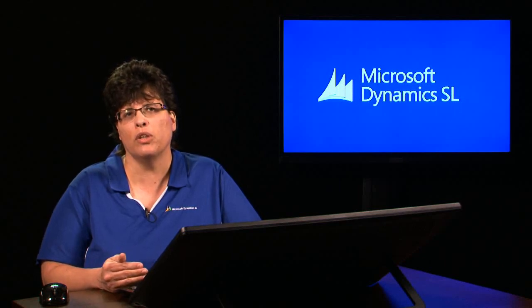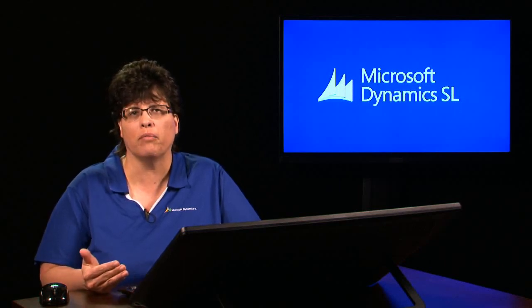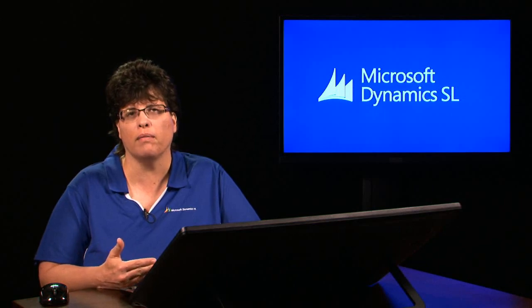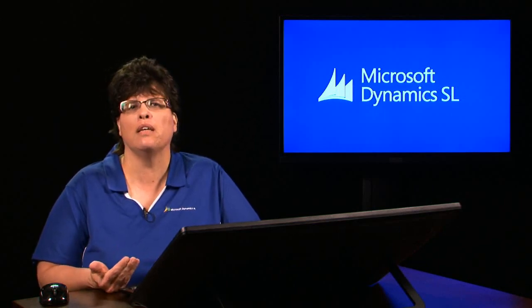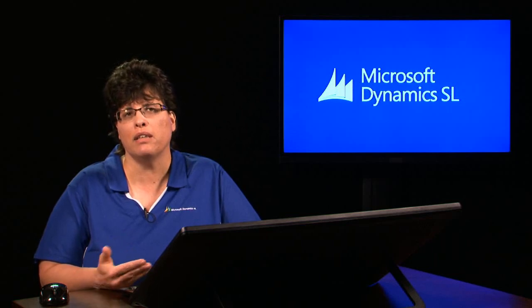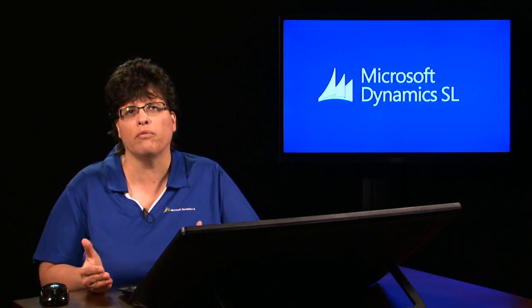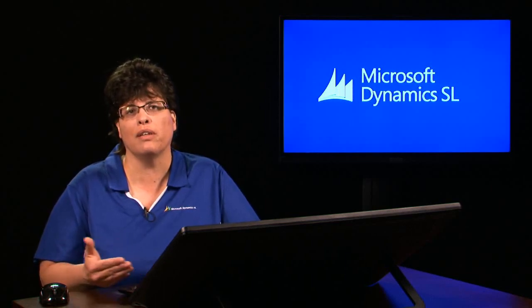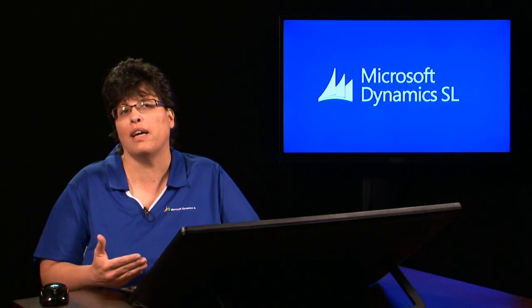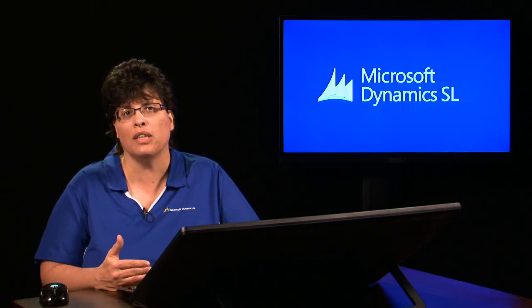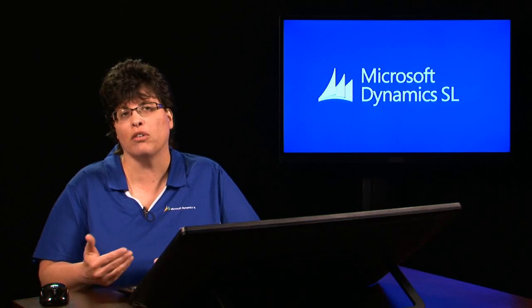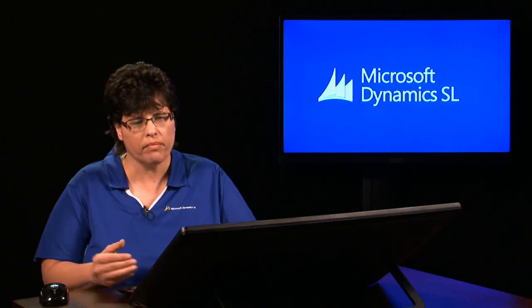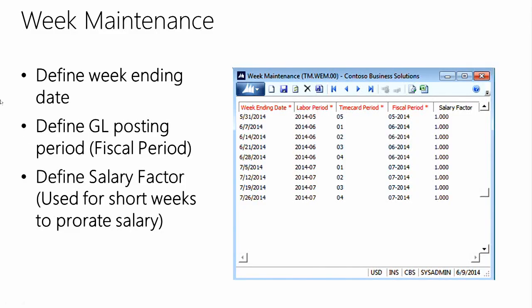So it's very critical when you post your time cards, it will identify the proper dates for each time card line item. We typically suggest a weekly week ending date, a week time frame to enter your time cards and submit them. Dynamics is flexible and it will allow longer and shorter time periods. So if you wanted to enter them daily and post them daily, you could. Just realizing if you had time card corrections, you would have to correct each day if that's the method you used. So let's look at the week maintenance screen because there's some very, very key information within this screen.